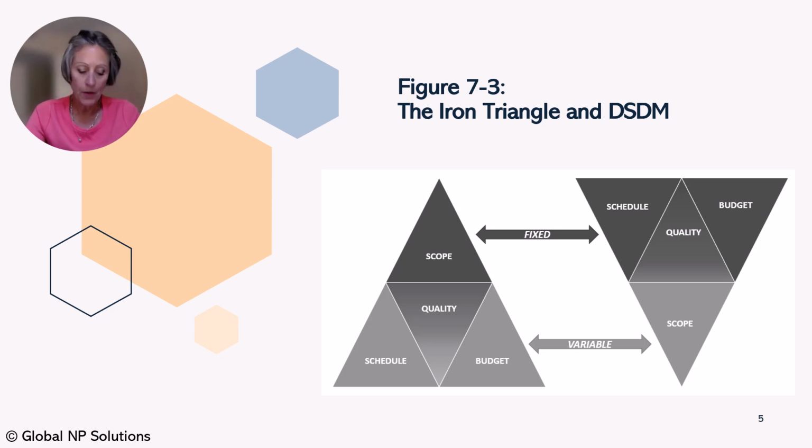The iron triangle. In traditional project management, the iron triangle, as in Figure 7-3 here, forces upfront planning to detail the project scope, schedule, and budget for quarterly delivery, with schedule and budget typically following the scope definition. If a project goes off track, the typical corporate response is to add resources or delay the schedule. Added resources increases the cost of the project and often results in missed deadlines as well. Frequently, a further response to delays and project miscues is to accept reductions in product quality, assuming that these times and items will be addressed later.